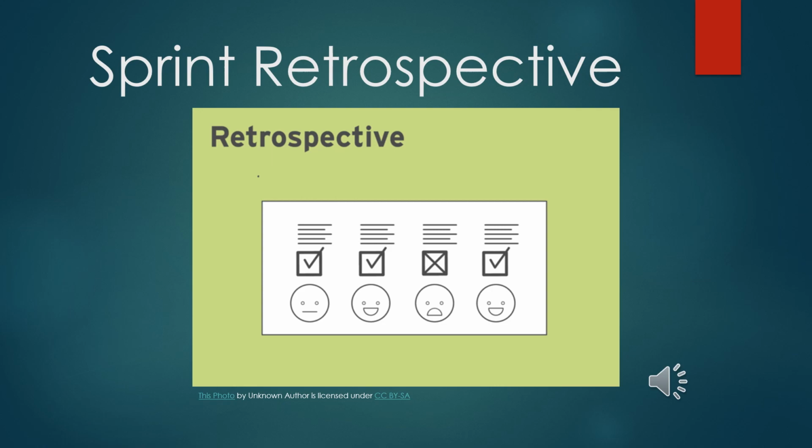It is the Scrum Master's responsibility to facilitate the retrospective in a way that would promote better team growth and performance. This can be done by asking open-ended questions, avoiding blaming, asking questions that would promote innovation, and highlighting team successes. Questions asked during the sprint retrospective include the following. What went well in the sprint? What didn't go well in the sprint? Are there any suggestions or possible solutions? The retrospective ceremony marks the end of one sprint and the beginning of the next sprint.